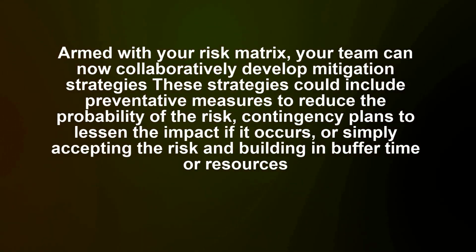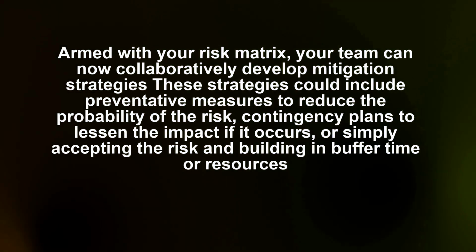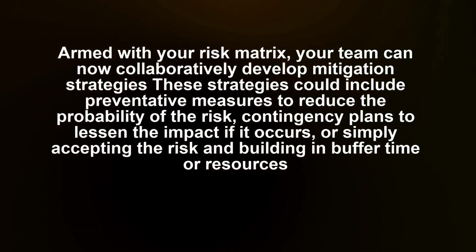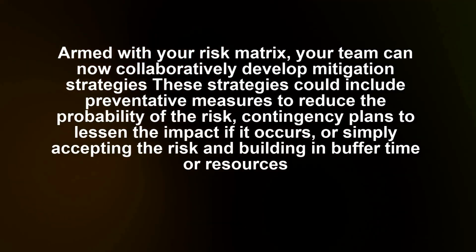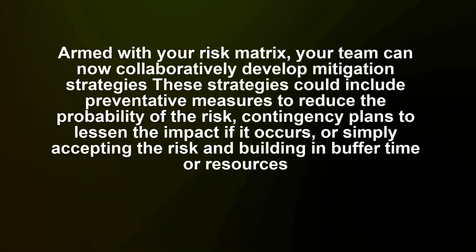Armed with your risk matrix, your team can now collaboratively develop mitigation strategies. These strategies could include preventative measures to reduce the probability of the risk, contingency plans to lessen the impact if it occurs, or simply accepting the risk and building in buffer time or resources.